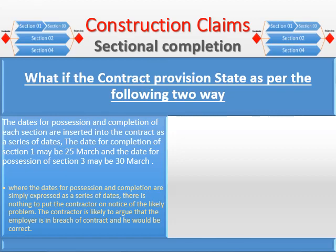Where the dates for possession and completion are simply expressed as a series of dates, there is nothing to put the contractor on notice of the likely problem. The contractor is likely to argue that the employer is in breach of contract — and he would be correct.